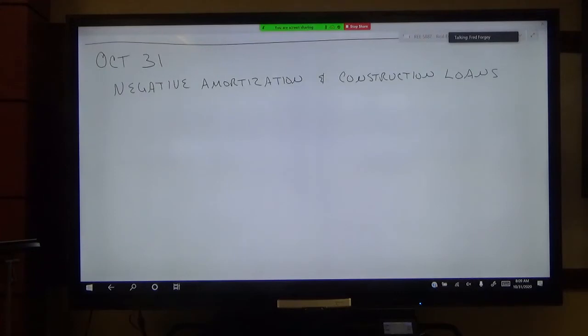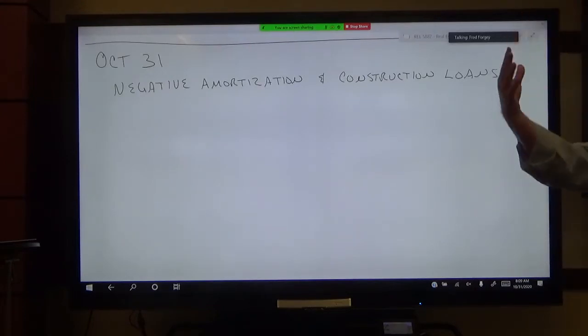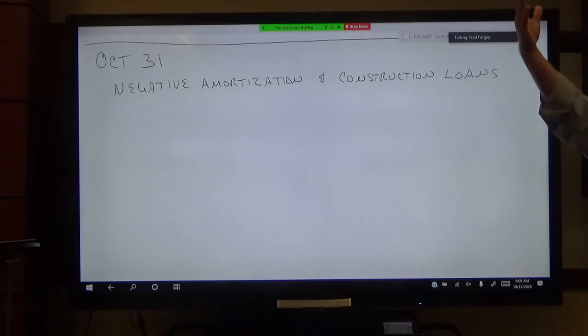And that happens, let's say, in the first month. Then the next month, you've got folks coming in, maybe doing framing or brickwork or whatever it may be. Same process, but you don't get that entire amount up front. You get it piecemeal based upon what has been done during the construction process. Okay, does that make sense, everybody?